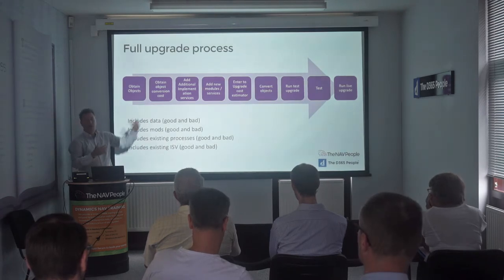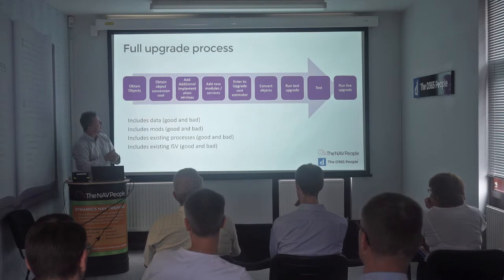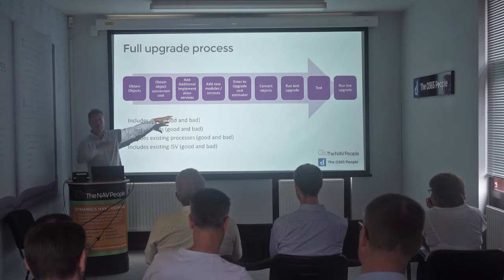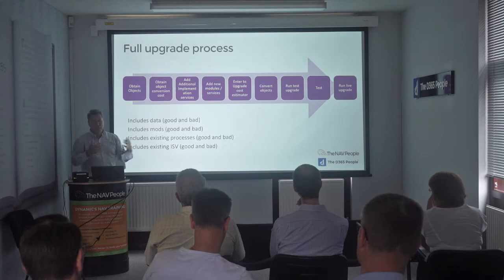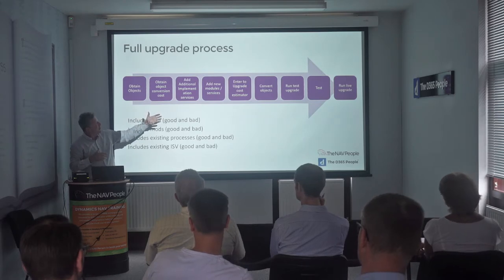We then say, obviously, you're going to want some help with UAT, data conversion, or additional data migration work possibly as part of that. You might want some new modules. You might want some user training, obviously, on the new screens and so on. We put all that into a cost estimator. Anne is our cost estimator expert, so speak to Anne. We've got an Excel spreadsheet based on the ones we've done. It's difficult to estimate these things because it's services based, but it's been reasonable at the moment in terms of accuracy.